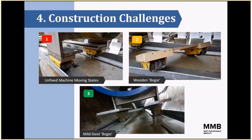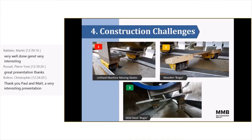We did a lot of innovative work on looking at ways of getting the pipe in. We looked at putting some fixed winches within the actual structure itself to pull the pipe up, but then we're fixing into an ancient brick scour tunnel, so we didn't want to cause any damage or detriment to it. We considered various track rails, which came through a subcontract package, which was a very costly option, and we thought, actually, with this solution here, we can do this ourselves. And that was the benefit of it, really.